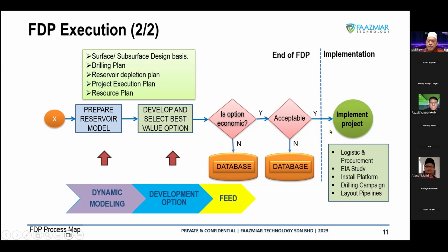And for the new area, normally they will ask us to go with the full EIA study. When you are in the early stage of exploration, because only one well and only a short-term duration, you can do a desktop EIA. But for such a big project, you have to do the full EIA, covering all the potential sampling of the area, getting the benchmark, and then giving all the strategies of how you're going to manage pollution. Then you are given the approval by the government to proceed with the project.